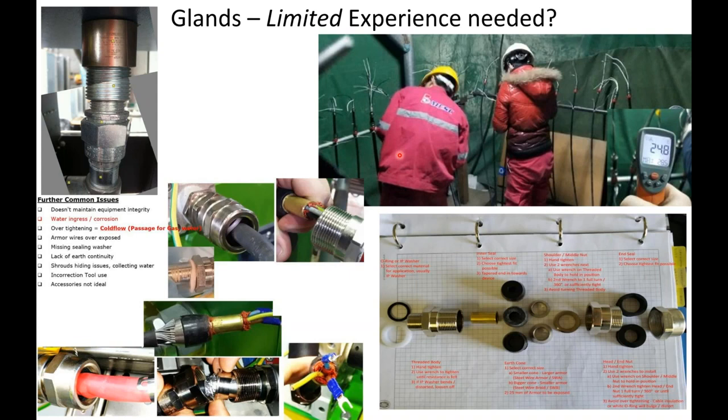One person prepares the cable. The other one puts the barrier compound on the cable. The other one came back and inspected the other person's work. We came back hourly and checked the process. So through mentorship, we helped increase their competency. There was our own in-house competency program, and it was very successful. And this model has been repeated in Italy, Australia, China, Kazakhstan.